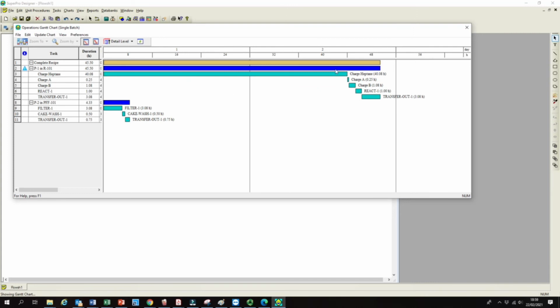And if you look, your reaction starts at the 0th minute and your filtration process also starts at the 0th minute. This is not true, because we need to start the filtration unit only at the end of all the operations performed in this particular unit operation, which is just a chemical reaction. So something is not correct.